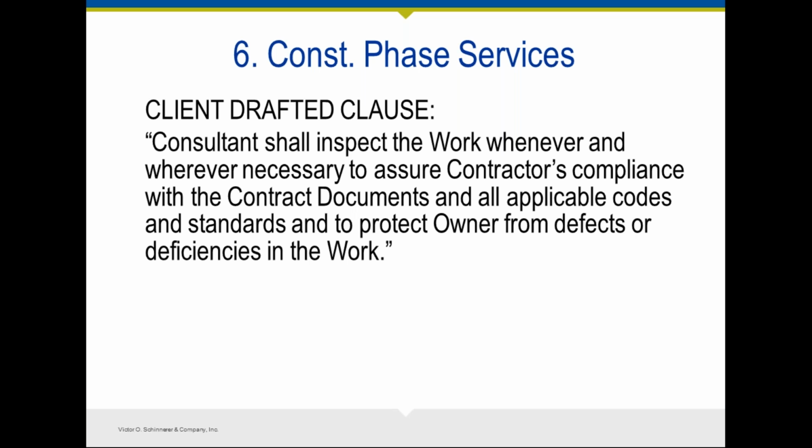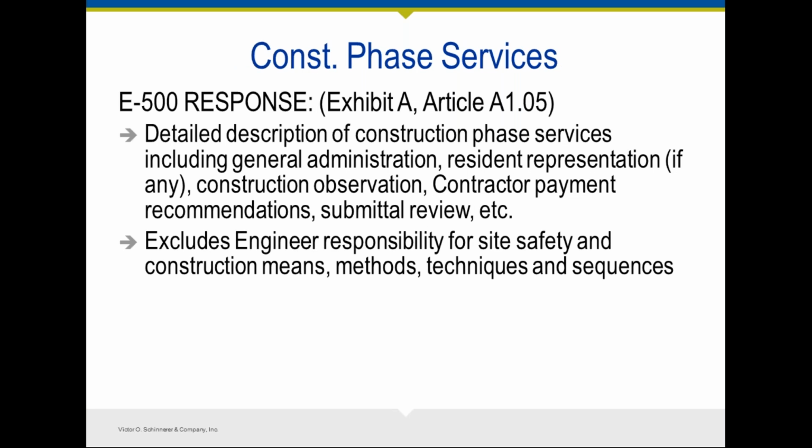A clause such as this allows the owner to make a claim directly against you because it imposes responsibilities on you that go beyond what is typically expected of a design professional. So it really comes down to what your scope of services is going to be during the construction phase. If you are going to provide detailed construction phase services where you have a resident project representative on site, that's fine. Let's base it off of the scope of services and outline what is expected.